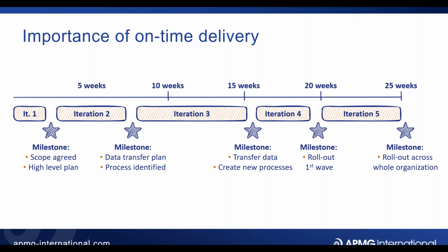But what I've also got to think about is how I'm going to decompose those 2 years against these different iterations. How long do I need to spend covering a little bit of getting started and iteration 2? How long do I need to spend with iteration 3, iteration 4, iteration 5, etc.? So I'm starting to always think about how many weeks we are dedicating to the various iterations so that I can be clear to the businesses that are impacted. This is when you can expect to see this change. And this is when you can expect to see things start to improve around here.